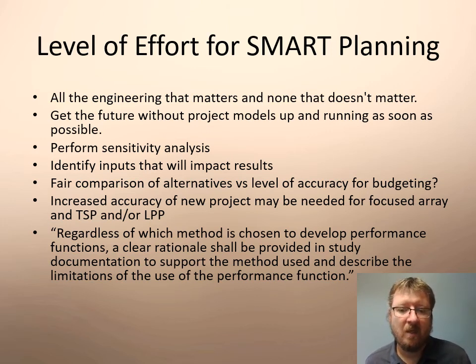So one other item that might come into question is, are we trying to estimate costs for a budget for congressional appropriation, or are we just trying to compare two alternatives on their relative performance to see which one is better? That question might make a difference to how much analysis is needed. If we're trying to be budget accurate, more analysis and more investigation may be warranted to refine the budget and have more confidence in it.